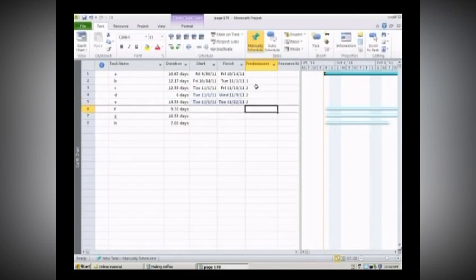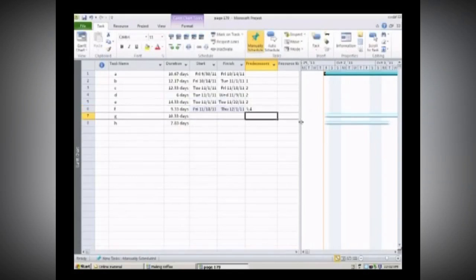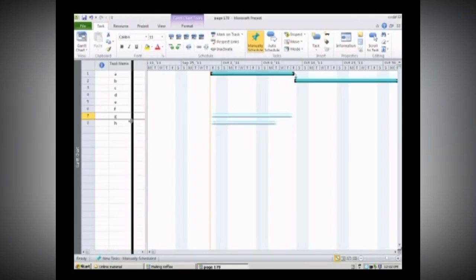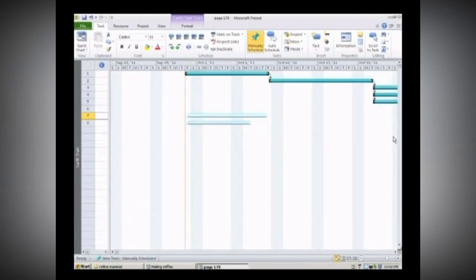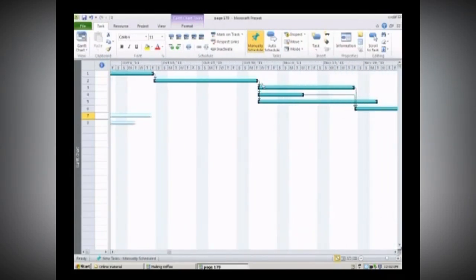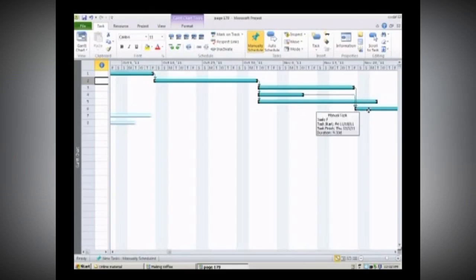We get down to line 6, which is task F, and we see that it has two predecessors — both C and D. So we're going to type in 3, 4, and enter. Let's have a look at that. You can see right here, and if we scroll over, we see that they merge. This activity here is called a burst activity, because as we come out of it, three activities follow it. Over here where two activities come together, that's called a merge activity.